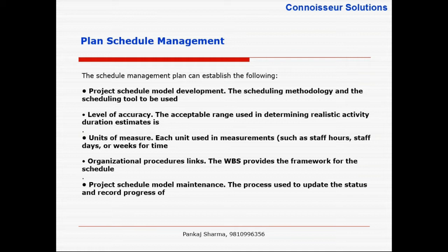See, remember, in pre-project, much before the project is initiated, we created a business case. Now, in the business case, since it talks about expected benefits realized over a period of time, and it also talks about the cost, at initial pre-project level, do you know requirements at detail level or high level? High level. So since you know requirements at high level, will you be relying on order of magnitude or definitive? You can't have a definitive estimate at that stage. So whatever cost or timelines you have considered during the business case should be based on order of magnitude or rough order of magnitude.